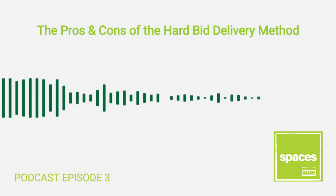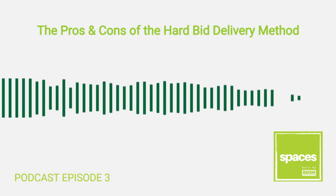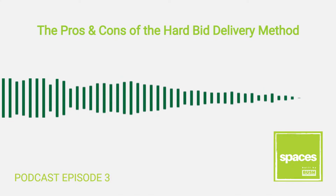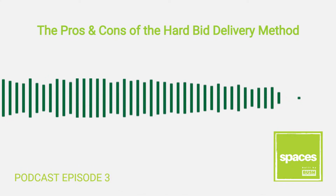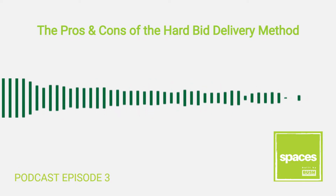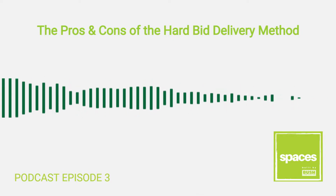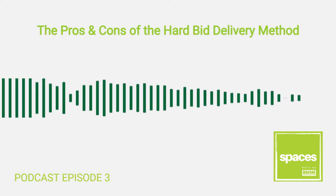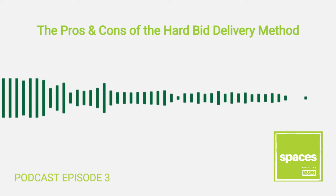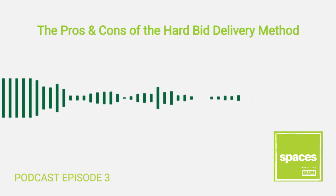It's been tested many, many times across the country, and for decades, this method has been used. So it's very well tested, and there is a perception among many that this delivers the best price. And while that's true, this delivers the best price for the design that's been designed, there is a lot of debate about whether or not the best design actually got priced. So would the involvement of a contractor have made that design better? Or would the price have been more accurate on bid day? So while, yes, it is very true, this delivers the best price for the design, whether or not that was the best design in the hard bid delivery method is a debate by many. So those are the pros.